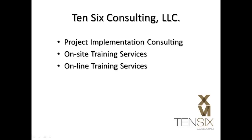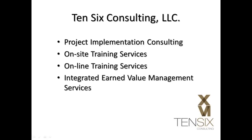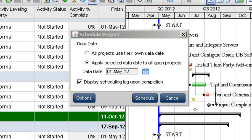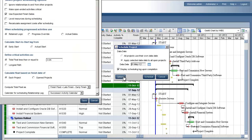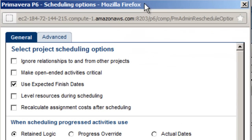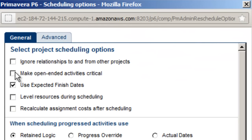Also be aware that you can schedule projects with the option to take into account resource leveling. This is selected in the schedule options dialog by checking the level resource during scheduling option. This will retain the activity start dates whenever the project is rescheduled.